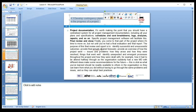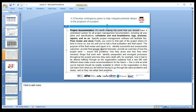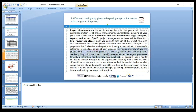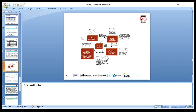Develop a contingency plan to help mitigate potential delays. When you do project documentation, the main points should be: a centralized system, your schedule and cost need to be broken down, look around the log, the reports, specific items, a final review and close. Compare actual versus forecast to find the variance — that will help you improve. For the contingency document, we should prepare: risk identification and location, risk impact, risk prioritization — high, low, medium — then risk mitigation planning, implementation and progress monitoring, and risk tracking. All this we have to do; it will help achieve the project objective.